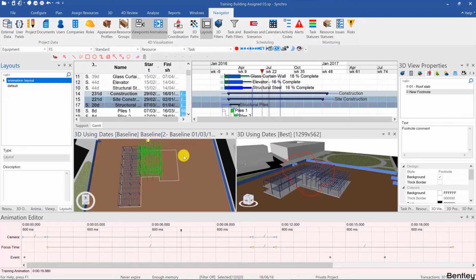And you'll get the same exact number of views, whether or not it's showing a baseline, the markup, the sorting, and the duration before the name. So it saves everything. And this is very useful to do before creating animations. This way, if you want to tweak the model, you can load the animation layout and then render exactly the same animation as you've rendered before, but with the tweaks that you made to the schedule.